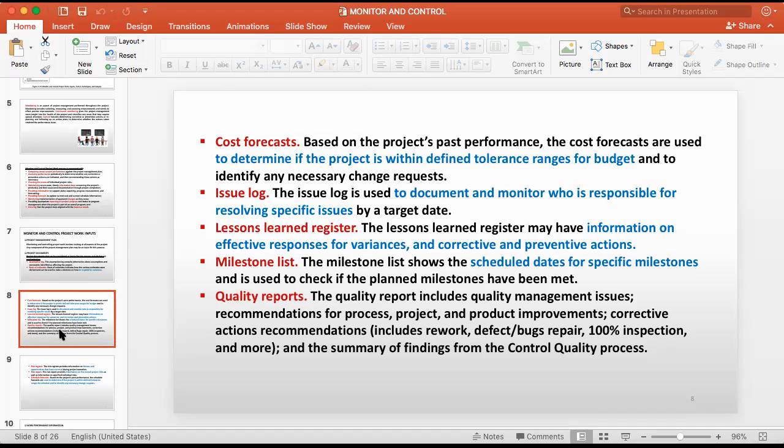Now similar price, similar commitment will be there for this work also, but that work we did 10 years back. So there will be a cost difference due to inflation, the rupee value and all that. So we add 20%, and this will be the cost for this work. Likewise, you can forecast your costs.